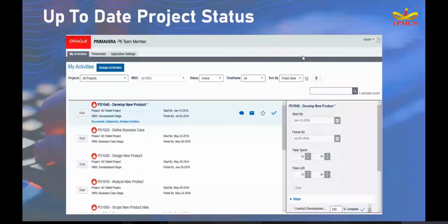Once the site engineer has done the actuals updation, they can submit it. This is the browser module screenshot. Once they have submitted, it comes back to the planning engineer's login, where the planning engineer or the project manager can review the status. They can either accept or reject. Once they accept, it automatically gets updated into the Primavera schedule.